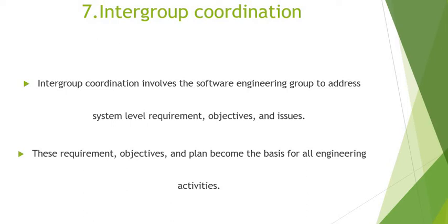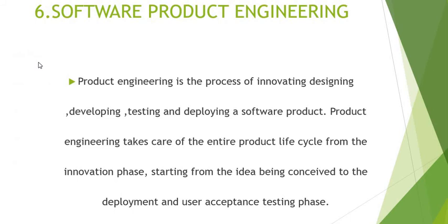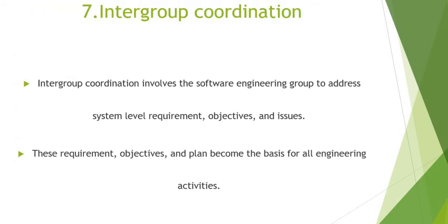Critical dependencies between engineering groups are identified, negotiated and tracked according to the documented procedure.